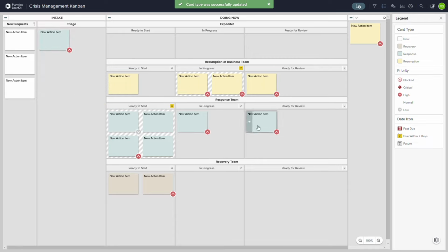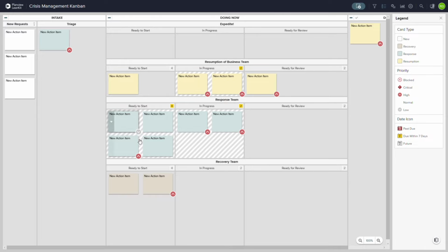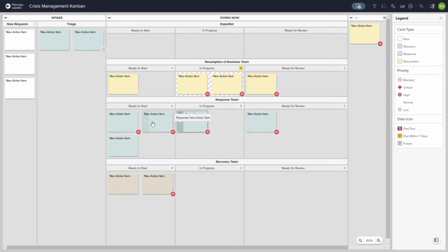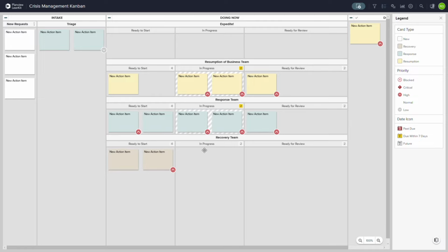They've got stuff that they're working on in progress, right? There's no room to pull it in. Well, the beauty of Kanban is this prioritization, because nobody's working on it, it can get reshuffled and redone at any point in time during replenishment, right? So if we needed to, we could deprioritize an item or two and actually add this one in the priority queue for the team. So to make sure that the next time they pull this item over and they have space, one of these high priority items comes over and we start clearing those items first, right?